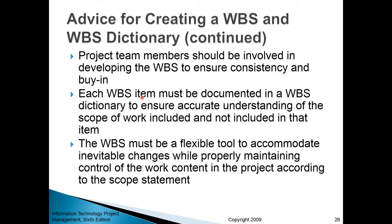Each WBS item ideally should be documented in a WBS dictionary to ensure accurate understanding of the scope of work by everyone. Your WBS also needs to be a flexible tool that can accommodate change — you need to track WBS items in a way where you can update them and record what was updated and when, so you don't get lost in different versions.